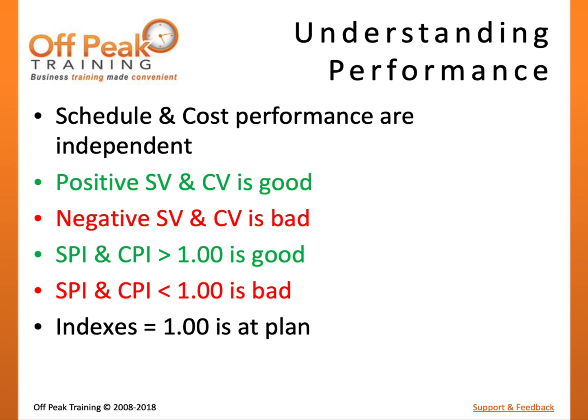It is important to understand that the performance measurements for cost and schedule are completely independent. One can be good while the other can be poor, and vice versa. The rule of thumb is that a positive variance equates to positive performance, such as ahead of schedule or under budget. A negative variance represents negative performance, and a variance equal to zero means performance exactly matches the plan. Similarly, performance indexes greater than 1 represent good performance, while indexes less than 1 represent poor performance. An index equal to 1 means performance exactly equals the plan.